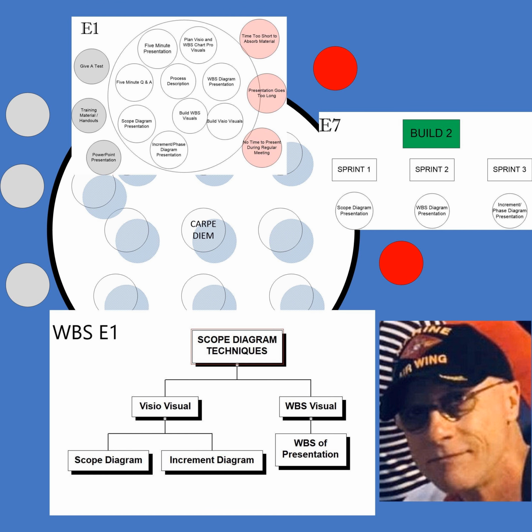Structured cabling complete. WAN network stand-up begins. Telecom coordination for backbone. WAN network stand-up complete. LAN stand-up. LAN stand-up complete. Security stand-up start. Security stand-up complete. Command center stand-up start. Command center stand-up complete. Fourth move. So every single week, this was the first page of a PowerPoint presentation. Let's close that. Let's go to P2, and this is the most interesting one.